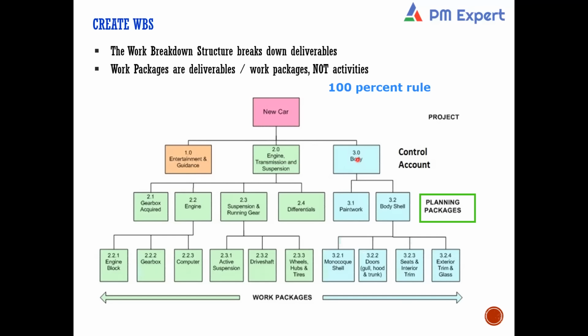See, it depends on the situation, on how big the project is, and on the intent of your financial accounting team, at what granularity they want to track the expenses. Each control account is like a separate cost head or a cost center. There is no hard and fast rule for it. You can have multiple control accounts, here, here, here, and you can have it at a lower level also.